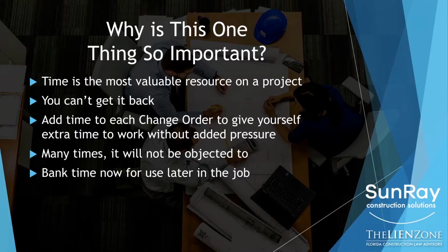The point I'm trying to make is that if you do it very early on in the course of the job, it is much more likely to be approved than if you wait until the end of the job when the job is already late. Then you can almost assure that you are not going to get voluntary extensions of time when the press and crush of getting all of the work done by this date, and it may already be past due, is upon you. So keep that in mind. Again, you should try to add time whenever you can. A few days here and there will add up in the course of the entire job.